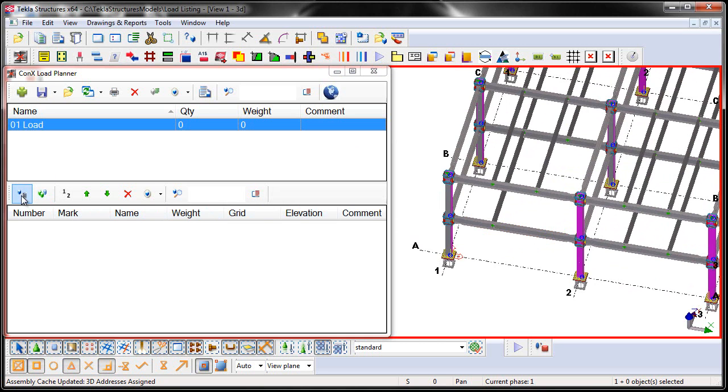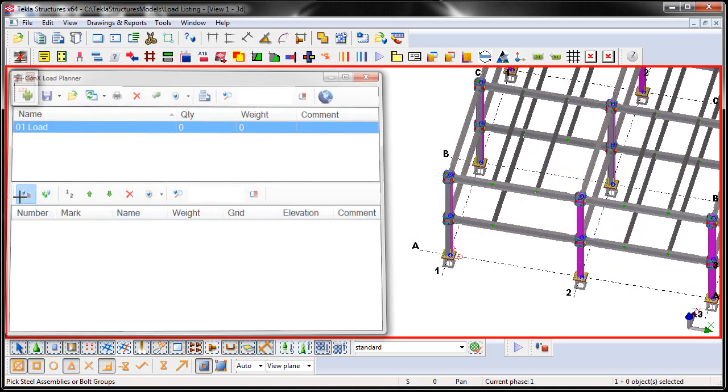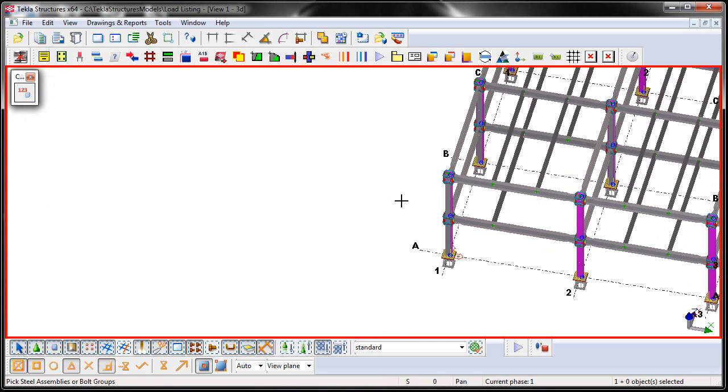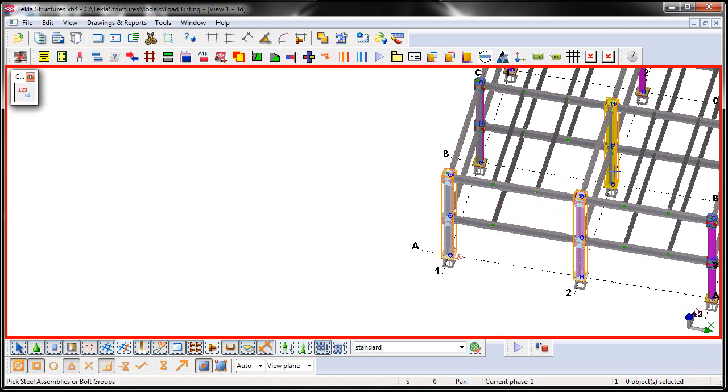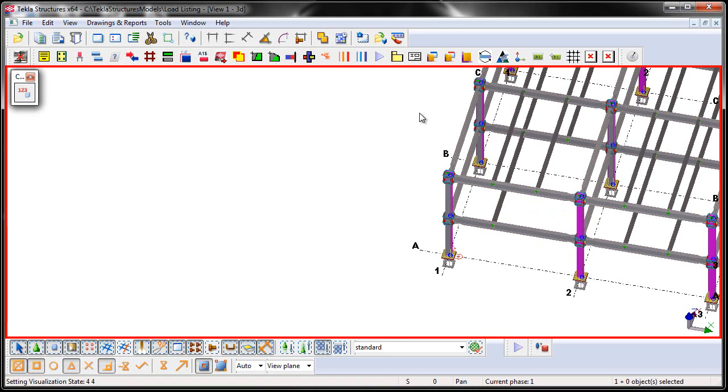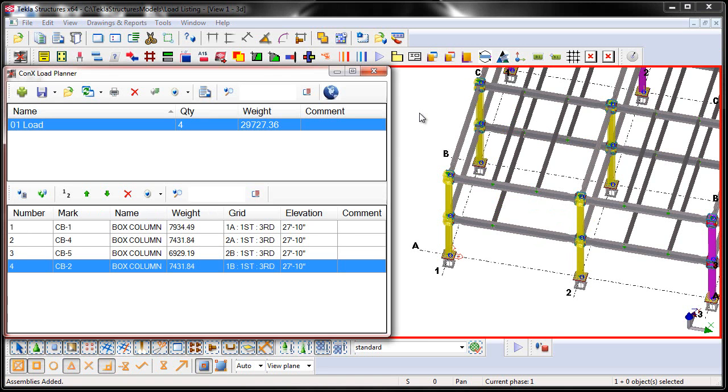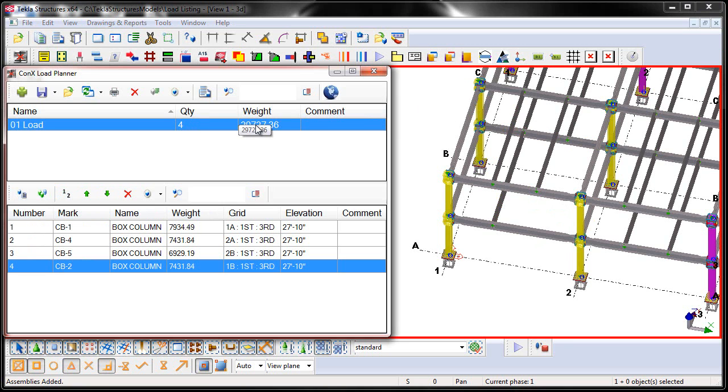Or I can choose this button and then I'm prompted to select the assemblies in the model in a particular order in which I want them added to the load. So here let's go ahead and just add these four columns. Once the selection is complete, you just middle mouse button to complete the command. Now you'll see that the four numbered assemblies are then added. The quantity is updated as well as the weight is updated on the load.